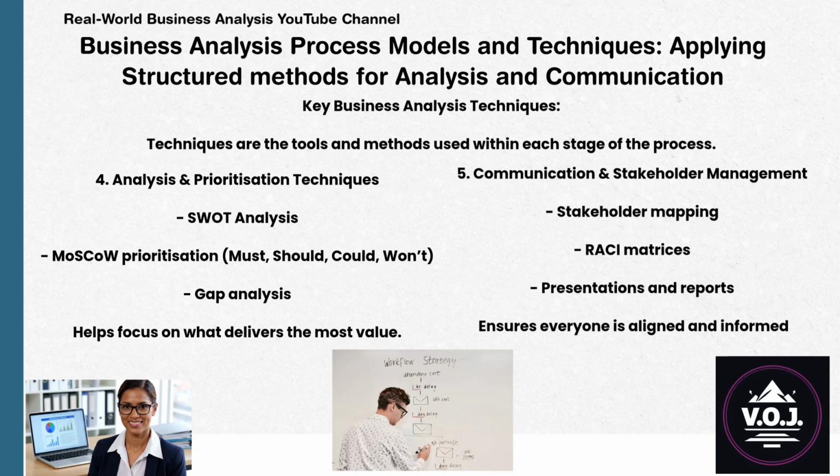Four is the analysis and prioritization techniques. The methods include SWOT analysis, gap analysis, and MoSCoW prioritization. MoSCoW stands for must, should, could, won't. This helps focus on what delivers the most value.